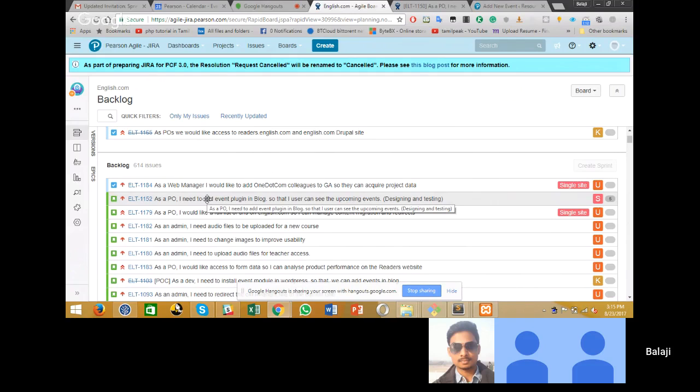So you want to push this into Sprint 75? Yeah, if we have the mock-ups, then yes. If you've got the mock-ups, it can go into Sprint 75. And when would you need the mock-ups by for you to be able to get it into that sprint? Our sprint starts from Friday, Friday 25th, and we have a holiday on Friday. So it should be okay if we get it on Monday, 28th.